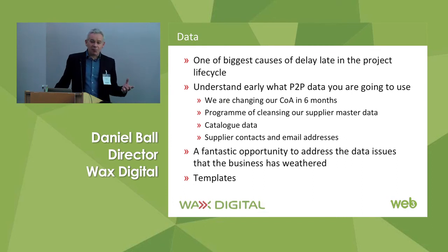The interrelationships between those data points are really important too. They have to work. So a lot of our clients actually undertake a data cleansing activity either in advance or as part of the implementation process, because it's a good opportunity to do it at that point. It becomes part of your overall project life cycle, but also part of your overall project cost, which can be